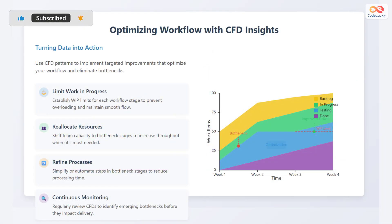Let's see how to optimize workflow with cumulative flow diagrams. Use CFD patterns to implement targeted improvements that optimize your workflow and eliminate bottlenecks. Establish work in progress, or WIP, limits for each workflow stage to prevent overloading and maintain smooth flow. Shift team capacity to bottleneck stages to increase throughput where it's most needed. Simplify or automate steps in bottleneck stages to reduce processing time. Regularly review CFDs to identify emerging bottlenecks before they impact delivery.